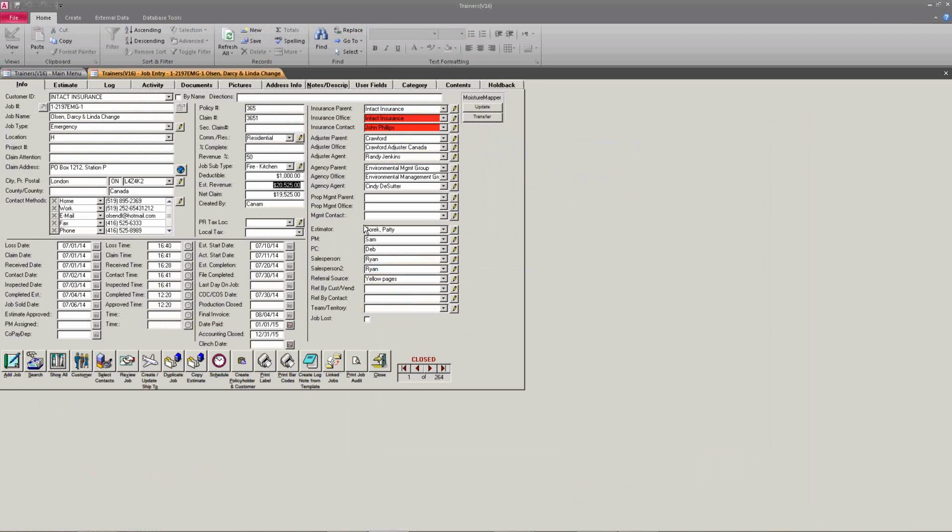If that policyholder chooses to paint their own walls, you will be giving them a credit. A lot of times they'll do something like that to cover off their deductible. Because you're not painting, you need to put in a negative paint allowance. You didn't do the work, you're not entitled to the revenue. So that can reduce this. Not every change is going to increase the value.